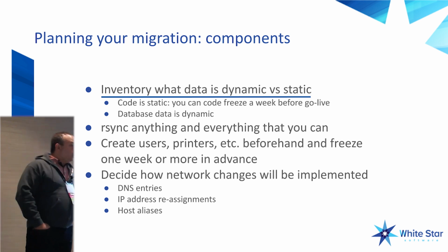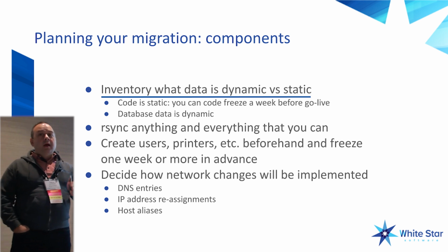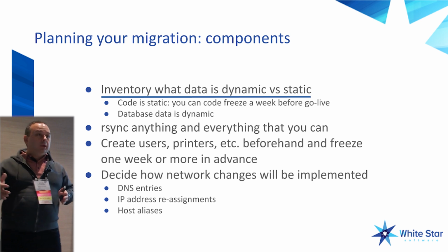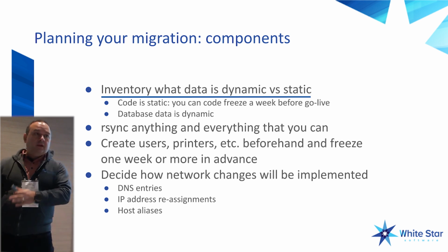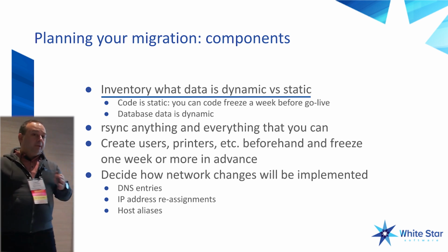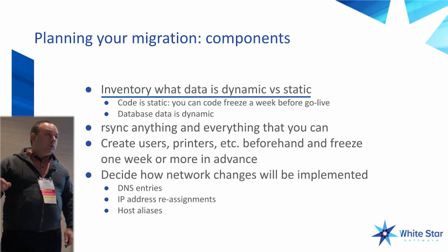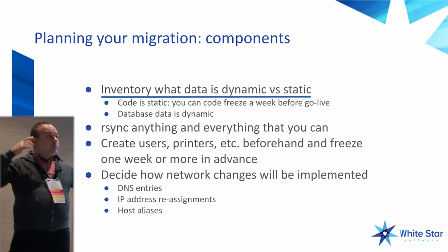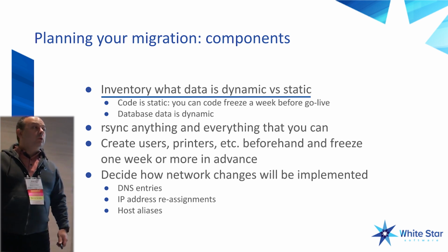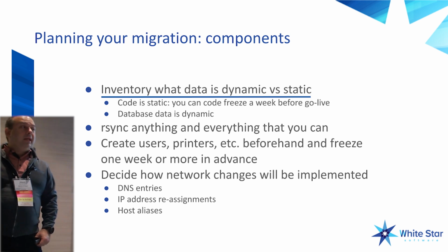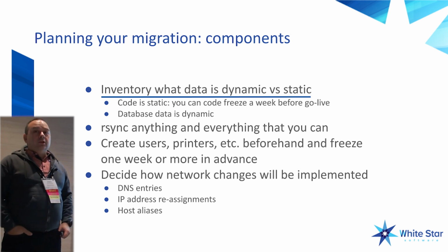Certainly, I tell people to code freeze and dictionary freeze at least 2 weeks ahead of time. And why? Because your DBA is going to prepare his migration. He's going to prepare the new machine for dump and load. And this has happened, I don't know how many times. You do all your prep work and you go to do your load and the schema's changed. And you find out that since you prepared the empty database for the load, they did a dictionary change. And now you're scrambling to recreate databases because they did a dictionary change.